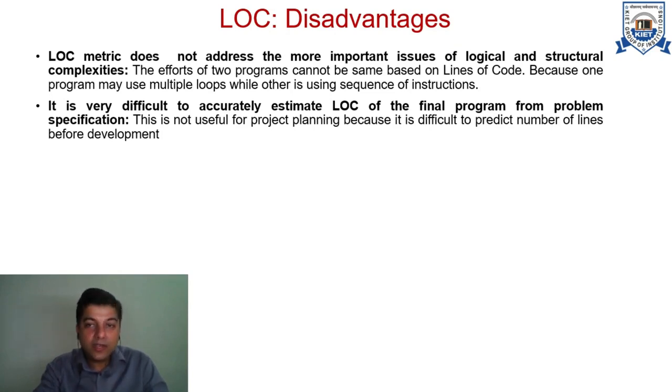Additionally, the LOC metric does not address issues like logical and structural complexities. So it does not take account of all these complexities which we have in big commercial projects. And it is very difficult to estimate LOC of a final program from the problem specification.